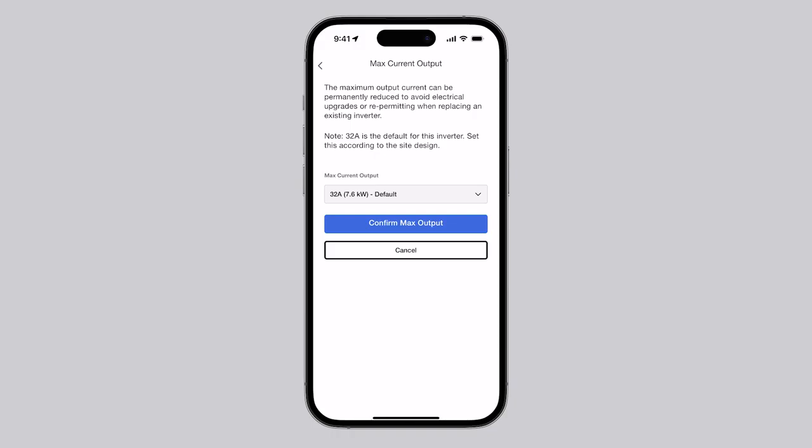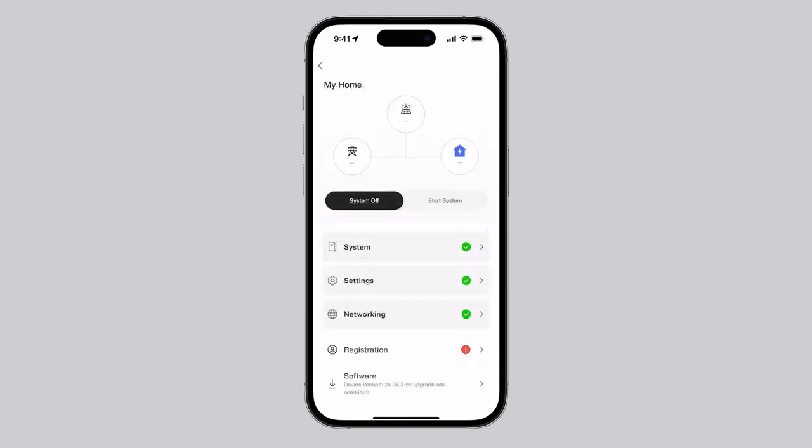When using the maximum current output setting, document the configured output on a PCS label on the solar inverter. Next, navigate to the Customer Registration page.